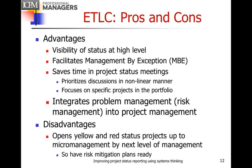There are advantages and disadvantages to the ETLC approach. Advantages include high-level visibility of status for upper management, facilitation of management by exception, time savings in project status meetings by prioritizing discussions, and integration of risk management into project management. The disadvantage is that it exposes yellow and red status projects to micromanagement by the next level of management — so if you don't want to be micromanaged, have your risk mitigation plan ready.